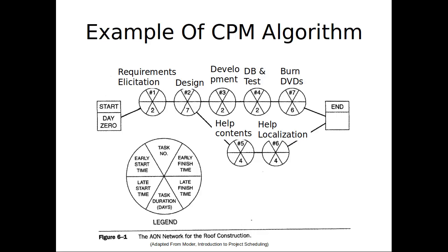By contrast, coming back the other way, what we were doing, and it occurred in node 2, was determining the late finish and using that to derive the late start. The late finish was determined by the minimum of the late starts of all the things that follow it. Because you can't finish any later than that without delaying the whole project, because one of those final ones won't be able to start in time to avoid delaying the whole project. So this 9 was the minimum of 9 and 11. Okay? Okay, so that's a two-phase algorithm.